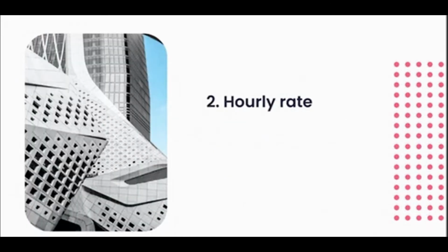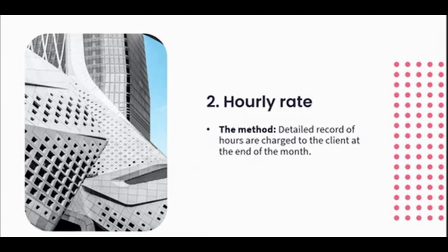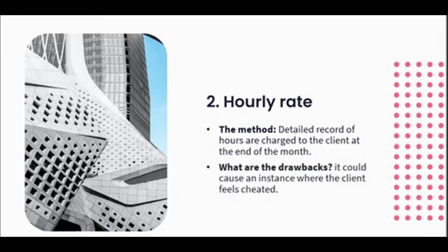Next, we have the hourly rate. This is a popular method or mode of payment, the hourly rate method, which has been used for many years by many different professionals. The way it works is that the interior designer is supposed to keep a detailed record of the daily work and the number of hours that they've spent to execute these works or design projects. The client then is required to pay the bill of these fees at the end of the month. So the monthly hours that are spent times the hourly rate, and that is then invoiced directly to the client.